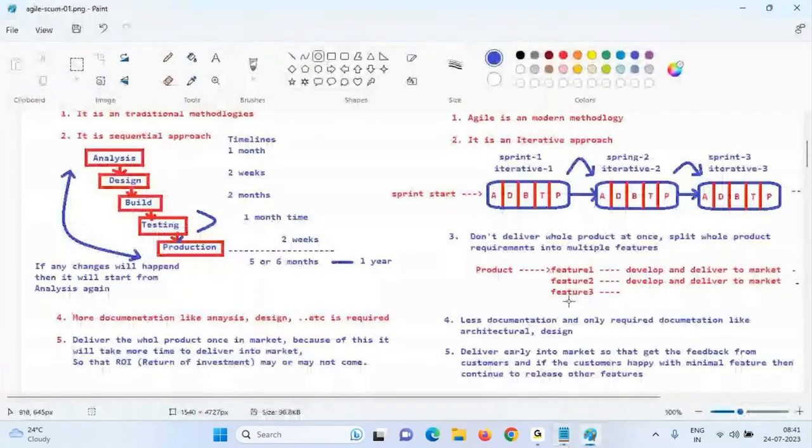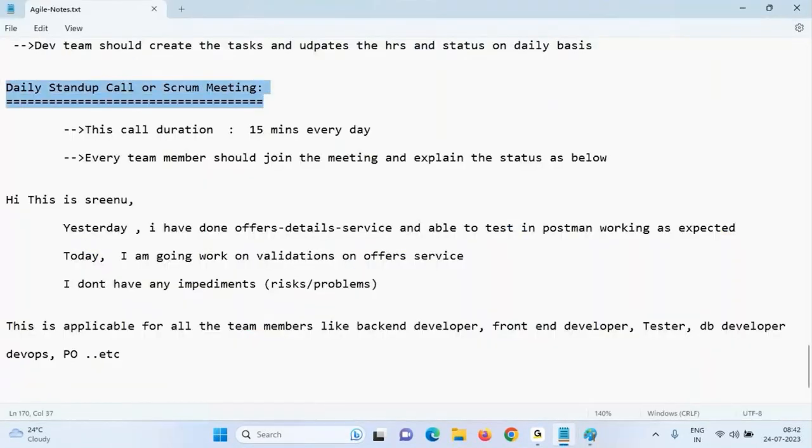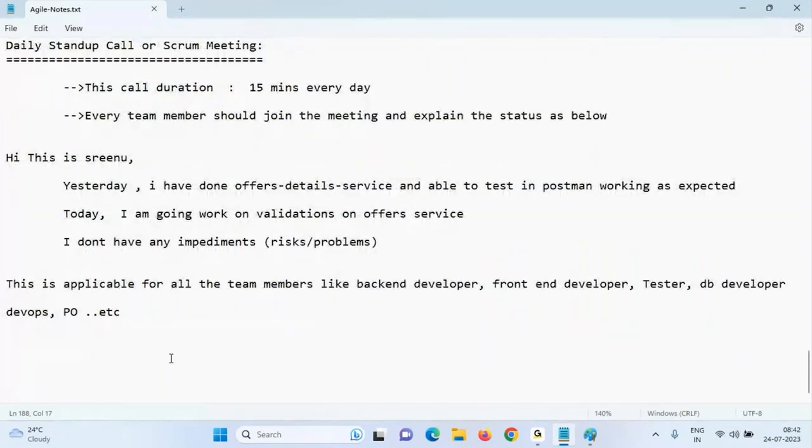Or they should know, okay, in this sprint looks like the delivery is not good because of so many blockers, so many issues. Either they will move all these stories to the next sprint, or depending, they will move into backlog, they will take new stories because this dependent system could not help on time. We can't deliver it now. It is called a daily stand-up call or Scrum meeting, team. Every day, it's kind of spoon feeding, team.